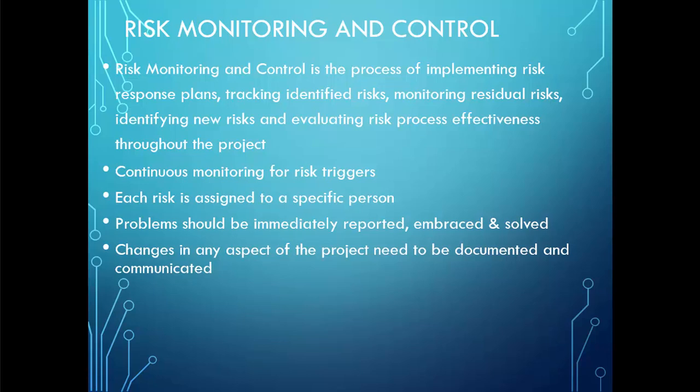There should be continuous monitoring for the risk to identify potential risk events early in a project. Each risk is assigned to a specific person who has the expertise and authority to identify and respond to an event. Identified problems should be immediately reported, embraced, and solved.